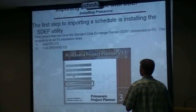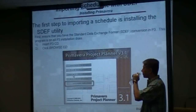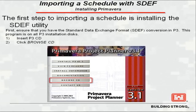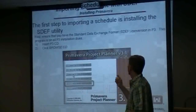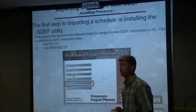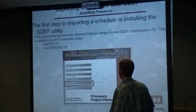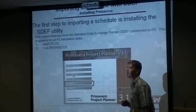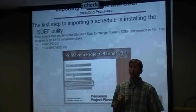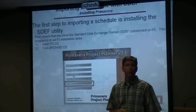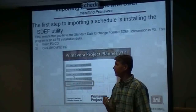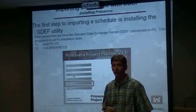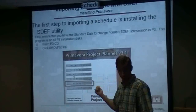On to the pay application in Primavera. If you are using Primavera P3, you will have to browse your CD and get the SDF utility off the CD. If you are using Primavera P6, you are going to have to call the company — Oracle — and have them tell you what to do to get an SDF utility onto P6. I don't know the answer to that; I haven't got it loaded. But if you don't know how to use P3, here are the steps.